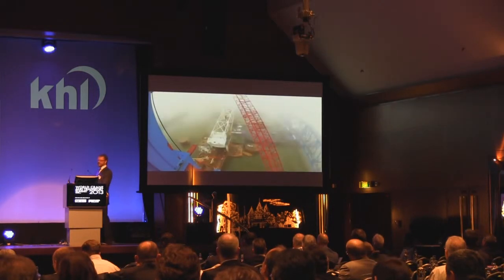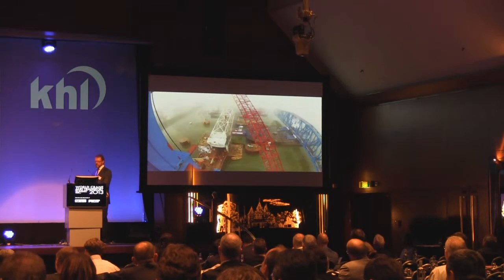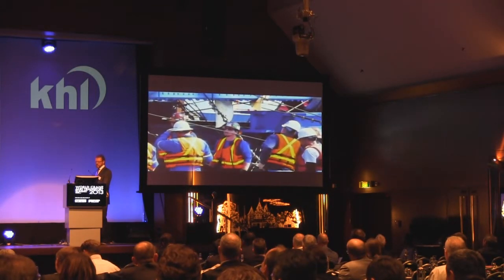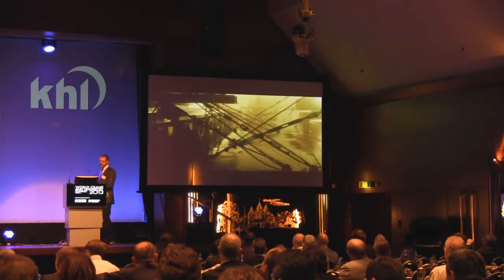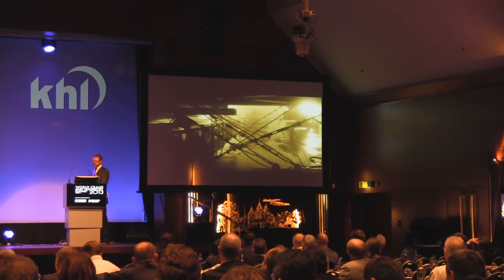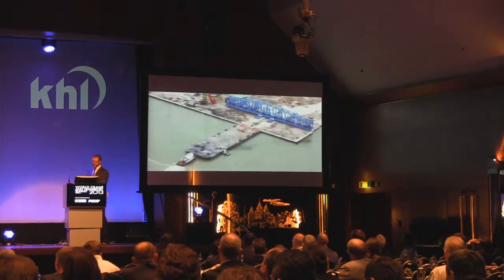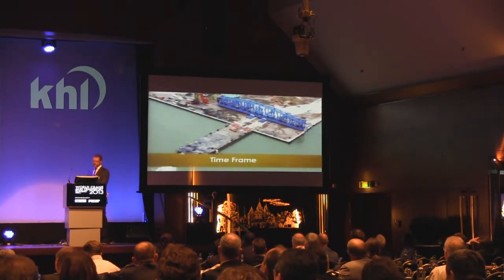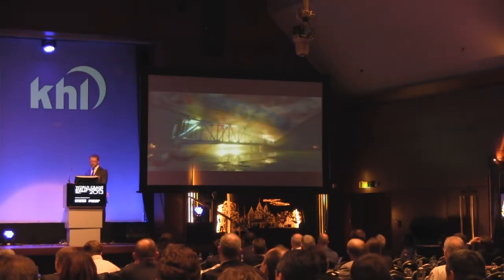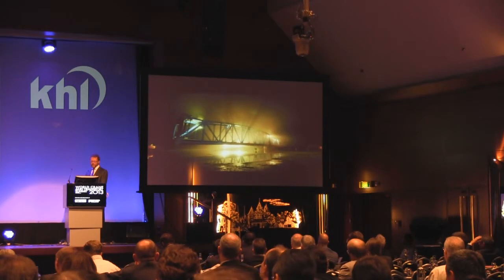We now had a 65-foot tall bridge sitting on a barge in the middle of the channel that had the ability to act as a giant sail. Preparation was key for safety and for the success of the job. A number of additional tie-downs were used to secure the bridge from wind gusts, and the overall precision rigging plan accounted for the wind presence. Time frame. It's already challenging enough to move a 387-foot wide, 68-foot tall bridge, but Burkhalter was working against the clock.